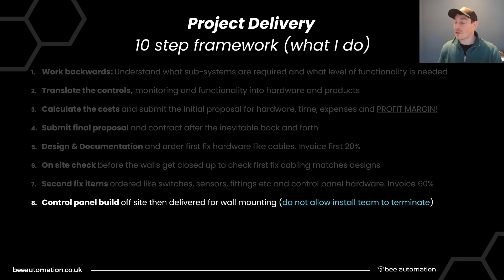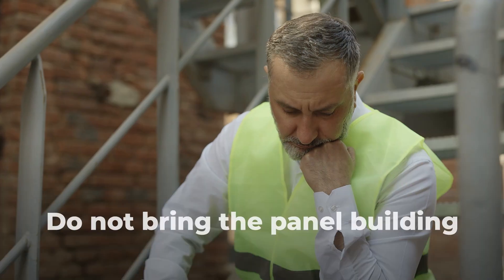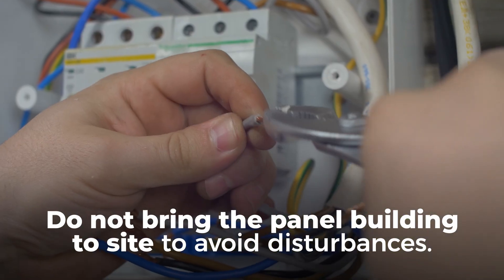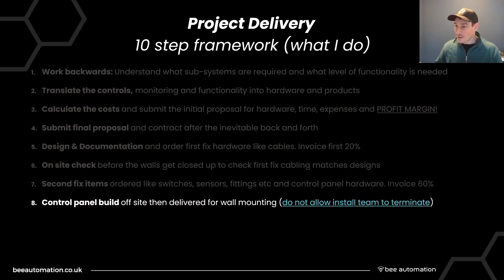Step eight is building the control panel off-site. A lot of people do this on site — don't. On site there are distractions that cause wiring mistakes you then have to fault-find. Dust and dirt gets into the electronics, and people move about and damage things. Build your control panels off-site — even if it's your living room or kitchen. Trust me, it's worth it. You can also do pre-commissioning testing and pre-programming off-site without distractions.